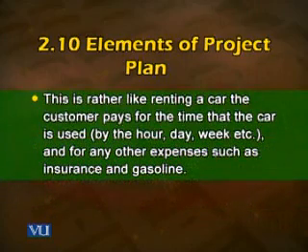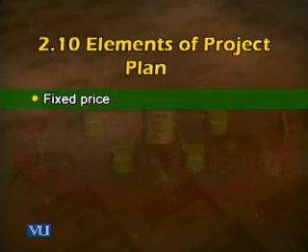This is rather like renting a car. The customer pays for the time that the car is used by hour, day, week or month, whatever the arrangement, and for any other expense such as insurance, petrol, etc. It's a user responsibility that needs to be added to the cost. That's one example, cost plus.